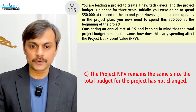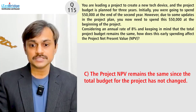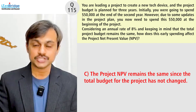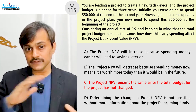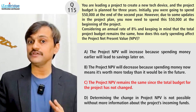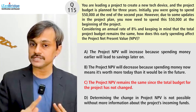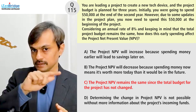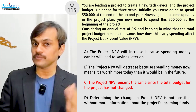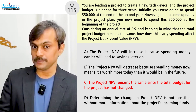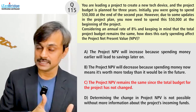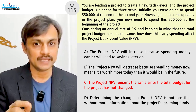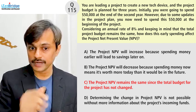Option C: the project net present value remains the same since the target budget for the project has not changed. As we said, even if the total sum is not changing, when we calculate net present value we are factoring the time value of money. Without factoring the time value of money, the dollar amount may not change. But if it is getting spent early, it is impacting the NPV calculation. So option C is not right.